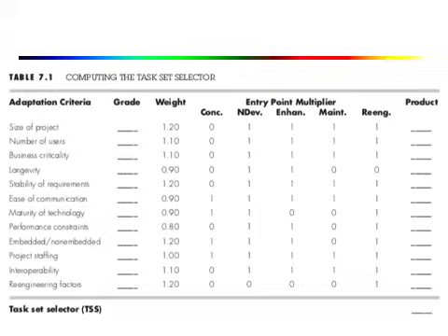Okay, so what you have to do is, as a first step, you are going to review these different adaptation criteria and give grades for each of these adaptation criteria, which ranges from 1 to 5 based on the characteristics of the project. Okay, and this will be entered in this table.